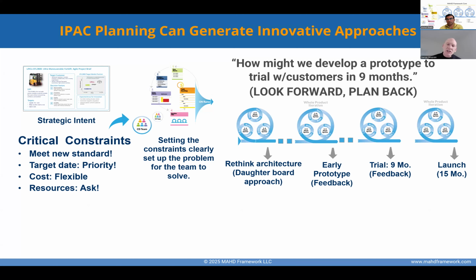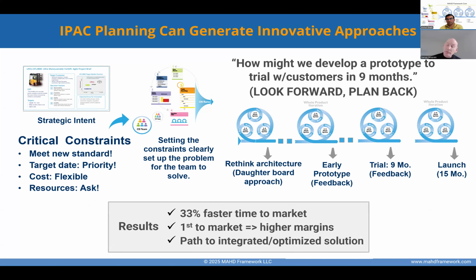So they rethought the architecture to think about how to do this new protocol on a daughter board by leveraging some of the core functionality and bringing it together. So they're able to do that quickly with an early prototype. They did get into trial in 9 months, and it was so successful with customers that they actually were able to launch it much earlier and get a full product in 15 months.